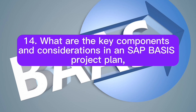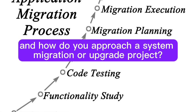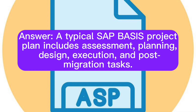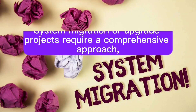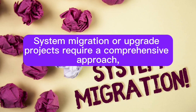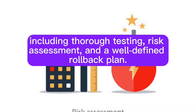Question 14: What are the key components and considerations in an SAP BASIS project plan, and how do you approach a system migration or upgrade project? Answer: A typical SAP BASIS project plan includes assessment, planning, design, execution, and post-migration tasks. System migration or upgrade projects require a comprehensive approach, including thorough testing, risk assessment, and a well-defined rollback plan.